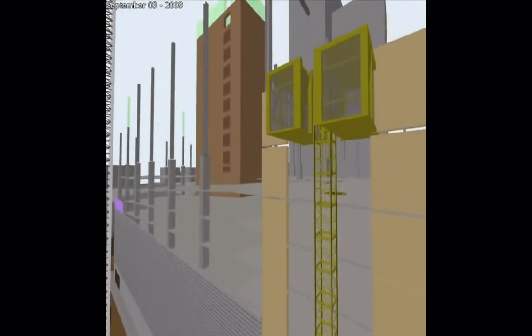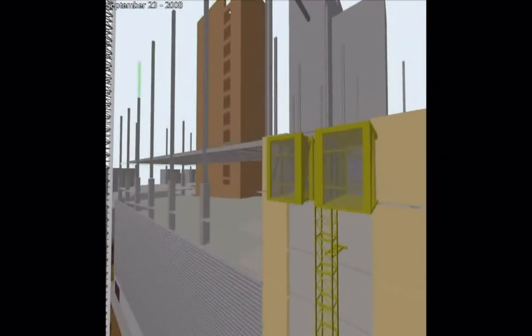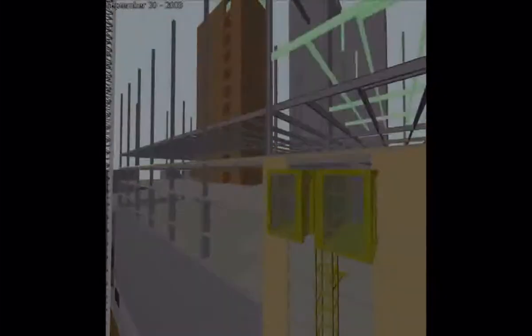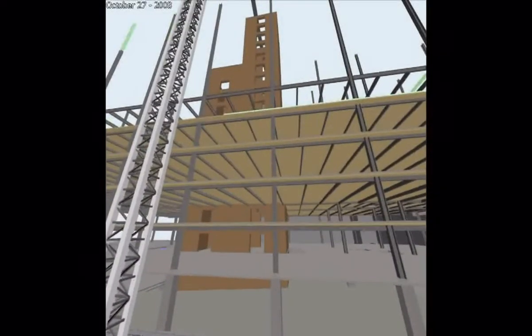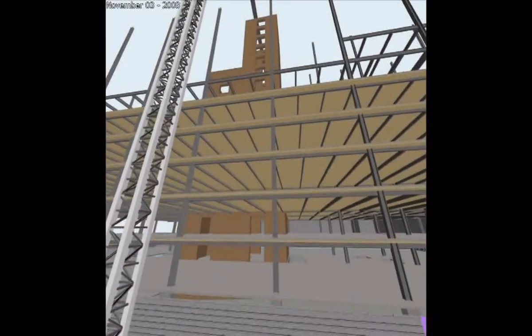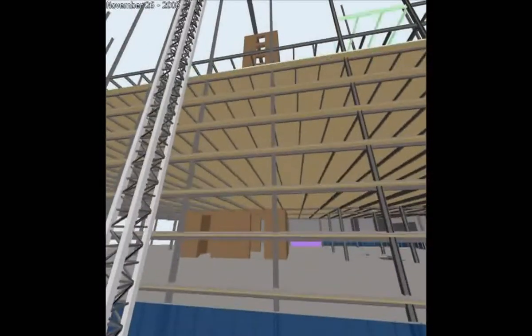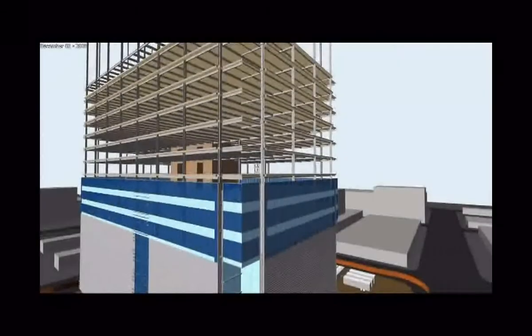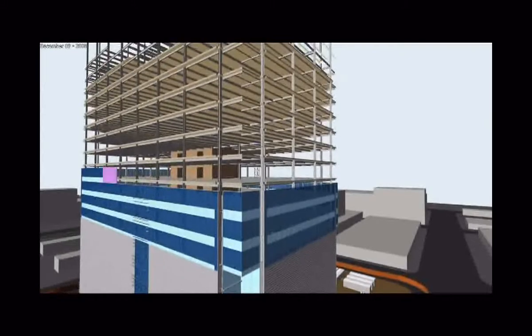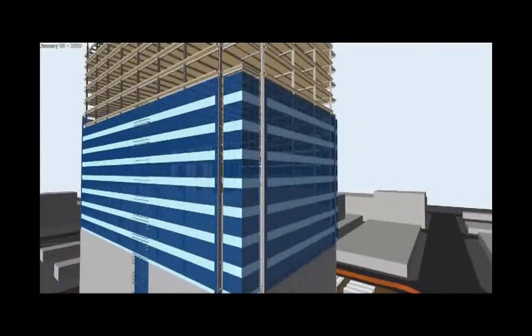During the project cycle, you can do what we call three-week look-aheads, where you're actually looking out for the next three weeks, bringing that information to the project teams and saying, look, this is a snapshot of the next three weeks. Sub A, this is where you're going to be working. Sub B, this is where you're going to be working. We don't want you guys to overlap — just basically focus on the different areas you're going to be working in.